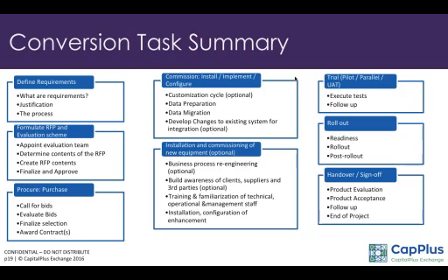I'll take one as an example. If you take formulate RFP and evaluation scheme, one of the most important things that you need to do is appoint an evaluation team. And the evaluation team should not be only from the management. It has to be from the operations, from the functional areas also. But it should not be a large team where you can't, in the end, build consensus and agree on certain decisions. I would say an evaluation team of 5 to 8 people maximum would be good.